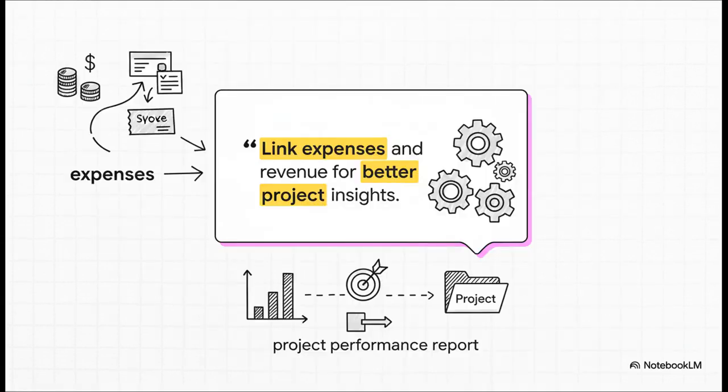And this quote from the Help Center just illustrates the core philosophy perfectly. You link every single expense and every piece of revenue to its specific project. When you send an invoice, you tag it. When you log an expense for materials, you tag it. All of a sudden, your day-to-day accounting isn't just bookkeeping anymore. It's actively feeding a real-time performance report.